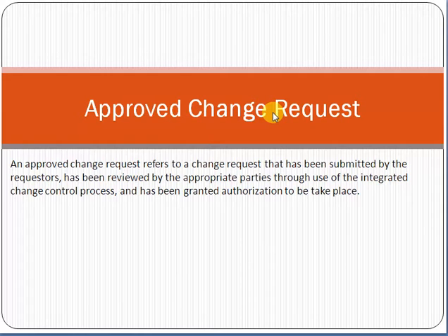So now, coming more deeply towards the term change request. First we want to understand the change request. Let me give you a very detailed example. For example, you are working in a software house, and you are implementing a mobile app for your customer. As per the signed scope of work, you have to deliver 5 modules to your customer. After some time, for example after 1 month, he is saying that he needs one more module, and you say that it's a new requirement.